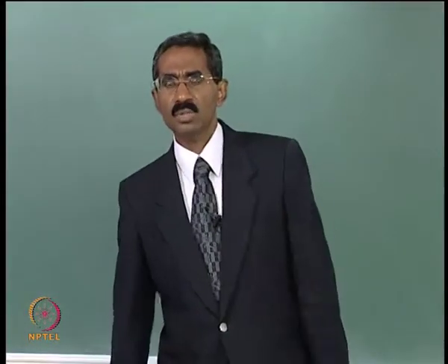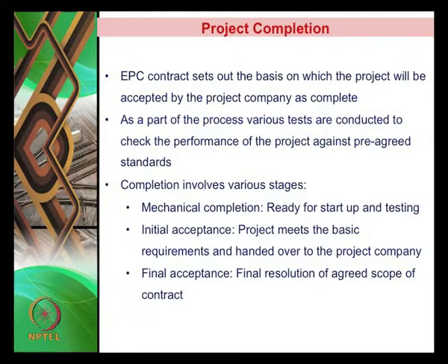The second step is your initial acceptance. So initial acceptance is where the project meets all the basic requirements and it can be handed over to the project company.